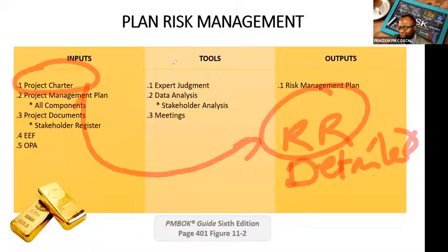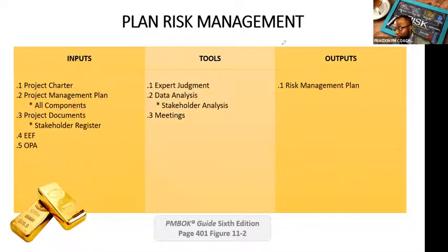but you need to be aware that they may try to confuse you about the risk register versus the charter, as its use here in plan risk management is because high-level risks are in the charter. So knowing some of the high-level risks that could affect the project is going to impact how seriously you take risks and may also prompt some of the methods that you use to manage risk. All right, so that is the very first process.